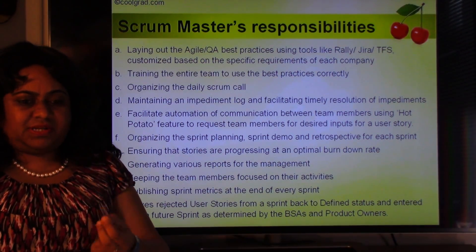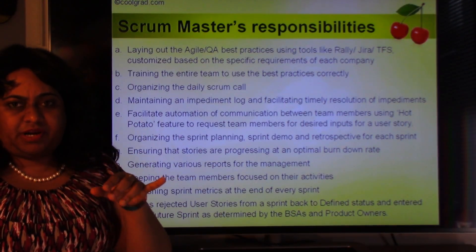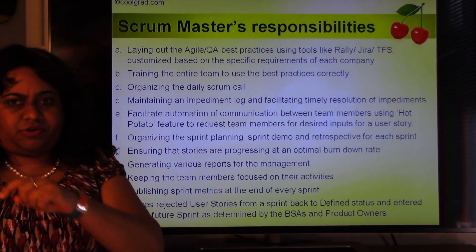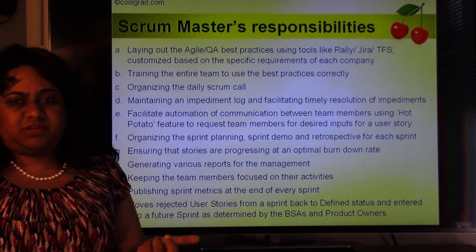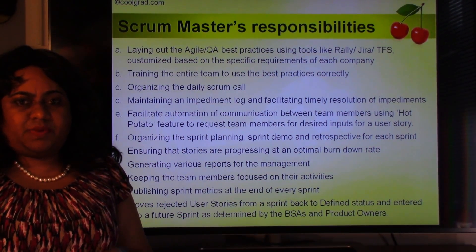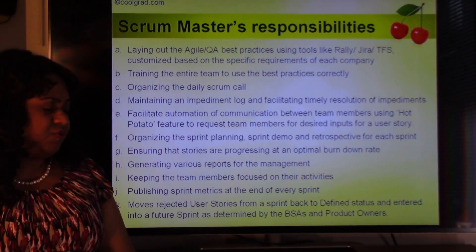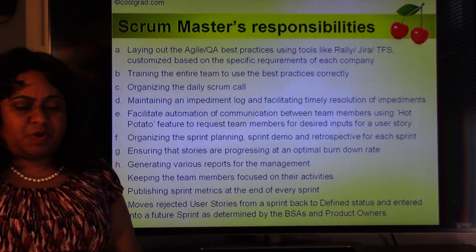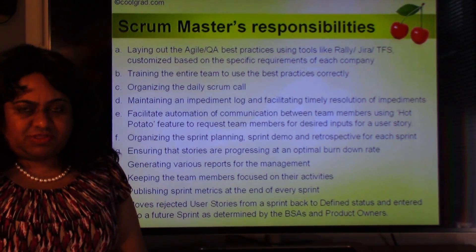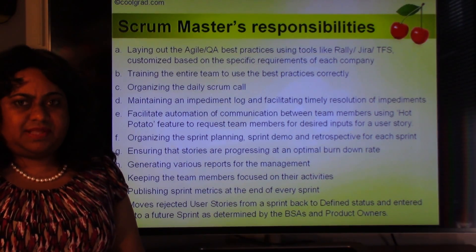The Scrum Master tries to automate communication between team members using something called a 'hot potato' feature. In a user story, there's a 'hot potato' dropdown — you pick someone's name, put a note saying what you want them to do, and they get a notification from Rally or whichever tool and must respond within 24 hours. The Scrum Master also organizes sprint planning, sprint demo, and sprint retrospective for each sprint. Sprint planning decides what to do in the upcoming sprint; sprint demo on the last day showcases all completed functionality; sprint retrospective asks what went well, what did not, and what can be done better.